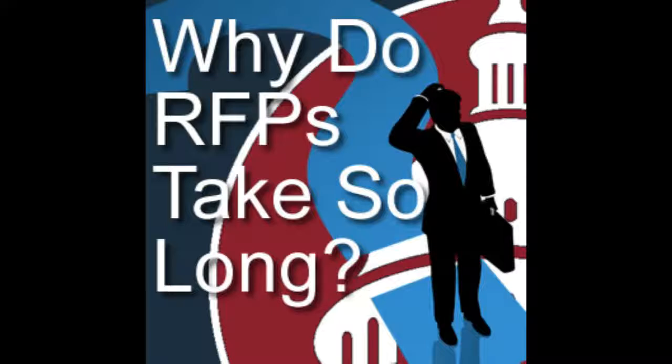There are processes, going back to you hear me talk about the 80-20 rule, 80% process. This is part of the process: before you, contracting officer and program manager, go out and spend $50 million on this equipment, because of that dollar amount, other people get a vote on what you're doing. In fact, they may get a veto on what you do. For example, if you try to do a sole source to a large business for something that you and I could go buy commercially, they get a veto, which means that you can't buy that. Right. So again, this is all part of the process to make sure this is done right.